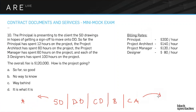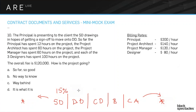After CA, there may be commissioning, warranties, or post-occupancy studies — but those must be specially delineated in the contract to get paid. A post-occupancy study would either be its own contract or listed as an additional service. That key term — 'additional service' — is how these things are generally broken out in contracts.